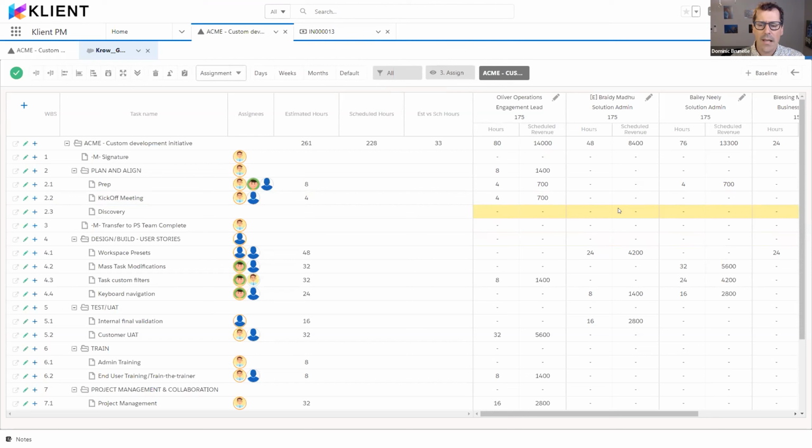Especially, I like to use that one up front when I'm building a proposal for a customer, building that price based on bill rates and assigned hours. So my resources are assigned here with a number of hours. When I'm up front with the proposal, it might be placeholders instead of actual people. But the concept here is that we can get quickly to a price based on hours assigned and bill rates.